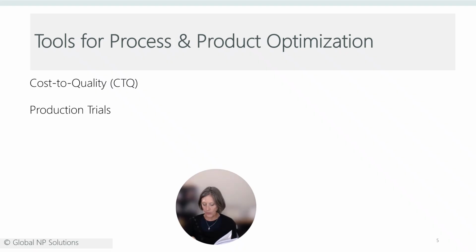In order to advance the new product to commercialization, both production trials needed successful results as well as complete quality and regulatory testing. Quality testing includes, as in the case of the household appliance producer, destructive testing to determine engineering parameters and product life guarantees. Other quality tests ensure that the first few items and last few items in a production run are manufactured to the same quality standard.